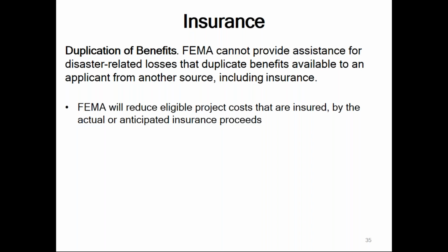The importance of this is that FEMA has to ensure that there is not a duplication of benefits related to the losses you'll claim under this grant, because FEMA will reduce eligible project costs that are insured by the actual or anticipated insurance proceeds. FEMA will expect the insurance company to pay first if your costs you're claiming are eligible